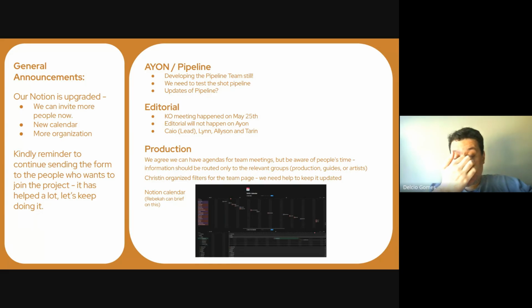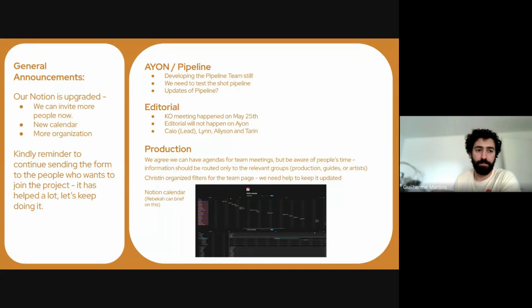So the sequence order is actually based on how many characters we have. The very first sequence that I want to lock is the beginning, the AOP. Yeah. Okay. So that is the one I would like to lock first, and then the ones where we get the drones. So basically the elevator and the ending of the rooftop. The elevator is the one where she's inside the elevator? Yes, it's just her and the drone and the unicorn.